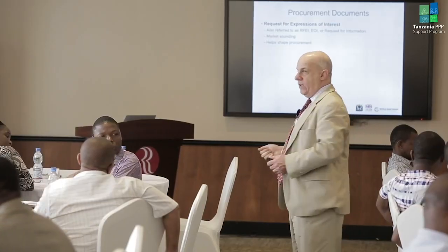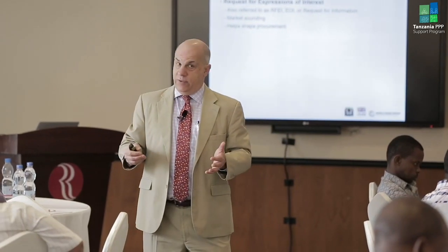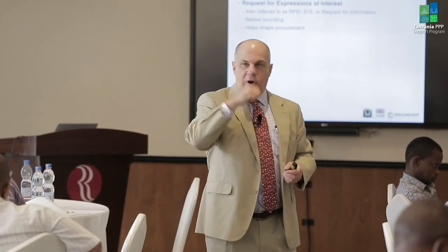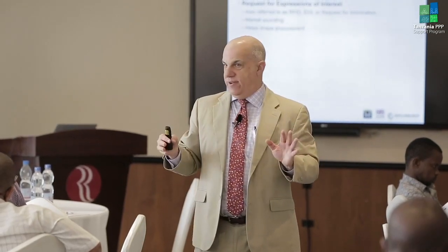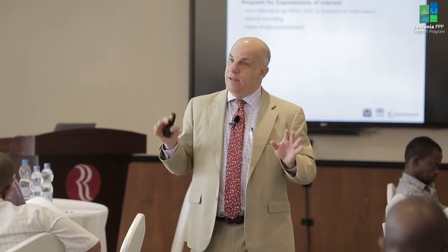Sometimes that RFEI could be like an RFI, request for information, where you may ask respondents, are you interested? And by the way, if you're interested, is there anything that we should know about this project, or any advice you might give us before we start soliciting proposals? So you're going to use the market. I mean, they're the experts out there. Let's see what they have to say. Now, let's be clear. They're going to want to make suggestions that might help themselves. That's fine. But you'll find things that they suggest that are helpful.